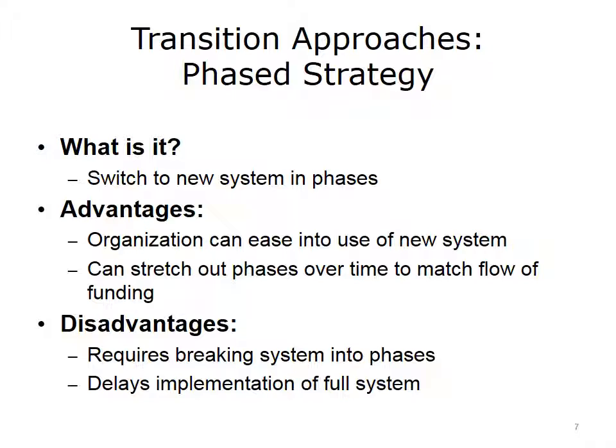The funding and staff may be appropriate for transitioning a phase at a time but not enough for implementing the entire system at once. One suggestion is to follow the patient flow. If the patient is admitted into certain units or areas and discharged from other areas, then those areas should come up together, so that one unit does not have to deal with working in both systems. An example is that you may want all of your surgical areas, both pre- and post-surgical units, to go live on the system at the same time.